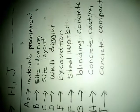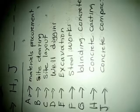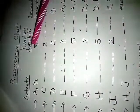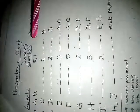These are all activities involving constructing a typical floor. Now let's look at a precedence chart. In the chart it lists the activities with the anticipated duration and the activities that have to be completed before you can begin the next one.